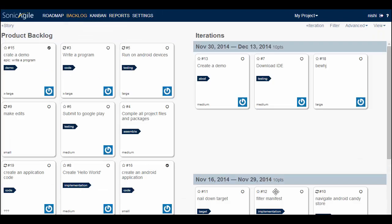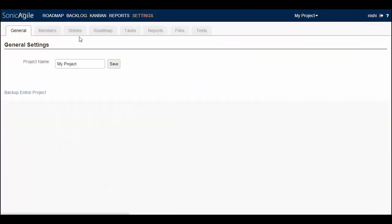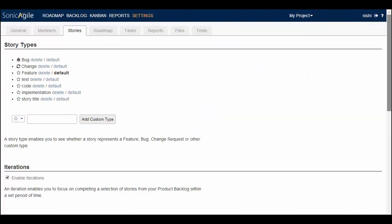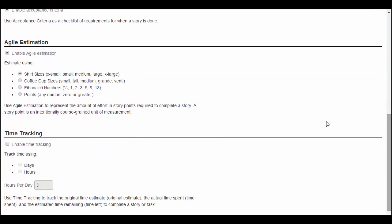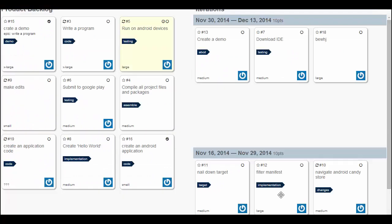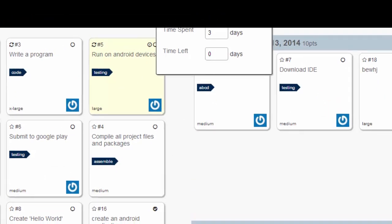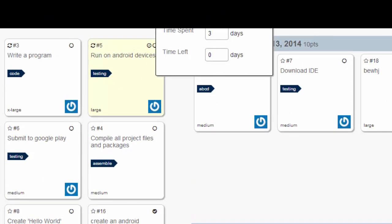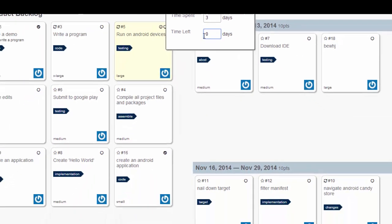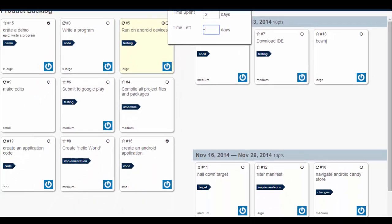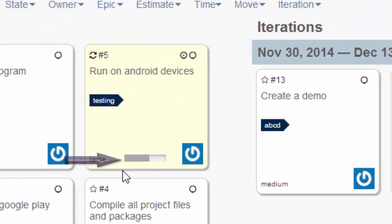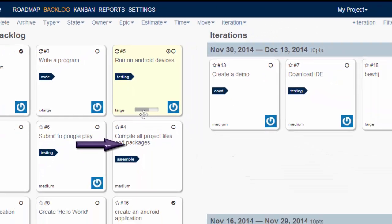Another feature of SonicAgile is Time Tracking. I can estimate the amount of time that should take to complete the story's task. For that I need to first go to the settings and then story and enable time tracking. After enabling time tracking, for a particular story, I can track my original estimate, the time spent on the story or the time left to complete the story. For example, I can write two days here. The progress bar on each story represents the amount of work left to complete the story.